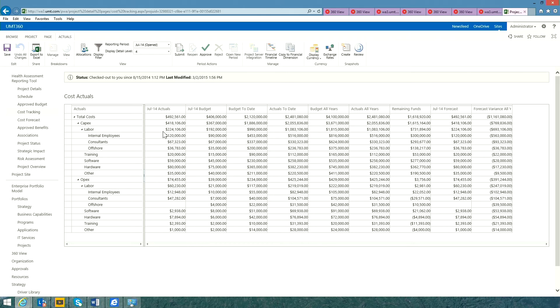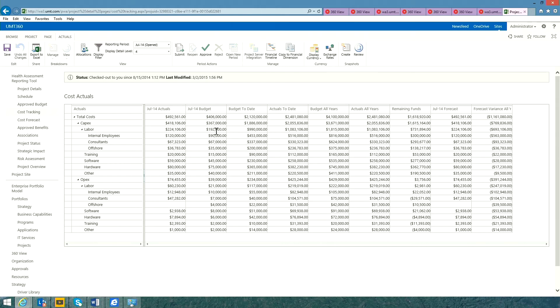There's three ways of doing that. I can manually enter information, I can leverage the ERP integration tool to dynamically pull the information in from your ERP system, or I can sync with the schedule. As you can see, UMT360 automatically calculates the variance, looking at actuals versus budget.